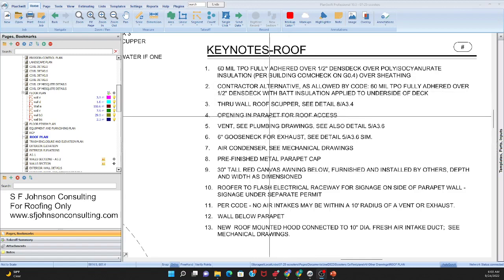How many square feet of that do we have? Chances are the roof finish is going to go over the parapet wall, and then we have some parapet caps. This is typical for every roof. We need the square footage of the finished material, the cricket sizes possibly, and how many linear feet of flashing for a particular purpose.